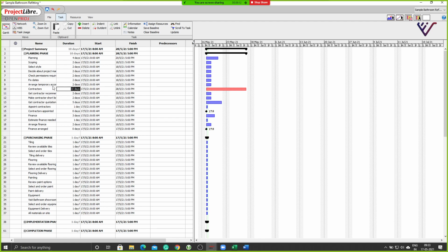Sir, if you don't mind, can you please explain the question mark again? See, the question mark in project summary is coming because of the question marks in all these other phases. When it is saying 1 day, this is something which the application has put by default. It is not a confirmed estimate fed by me. So when I make this say 5 days, it becomes a confirmed duration of that activity.